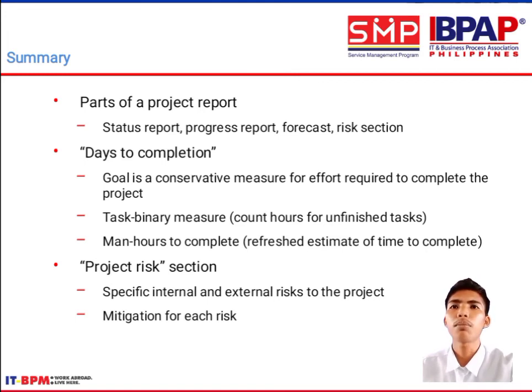Next, the parts of the project report are the status report, progress report, forecast, and the risk section. Days to completion: the goal is a conservative measure for the effort required to complete the project. Task binary measure, or the count of hours for unfinished tasks. Man-hours to complete: a refreshed estimate of time to complete.